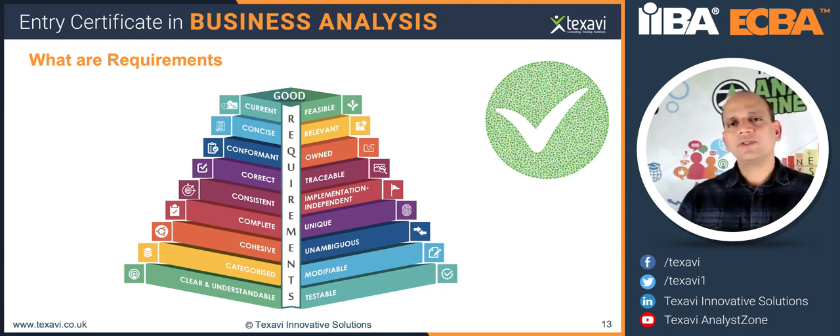So when I say user story, as we discussed before, it's the INVEST principle, right? So independent, it's independent, but it's not just independent. It should be able to pick it up and compare and contrast and negotiate with other such stories. So in the place of that, can I use this? Yes, I can. Yes. So it should be in a way that it is complete in itself.